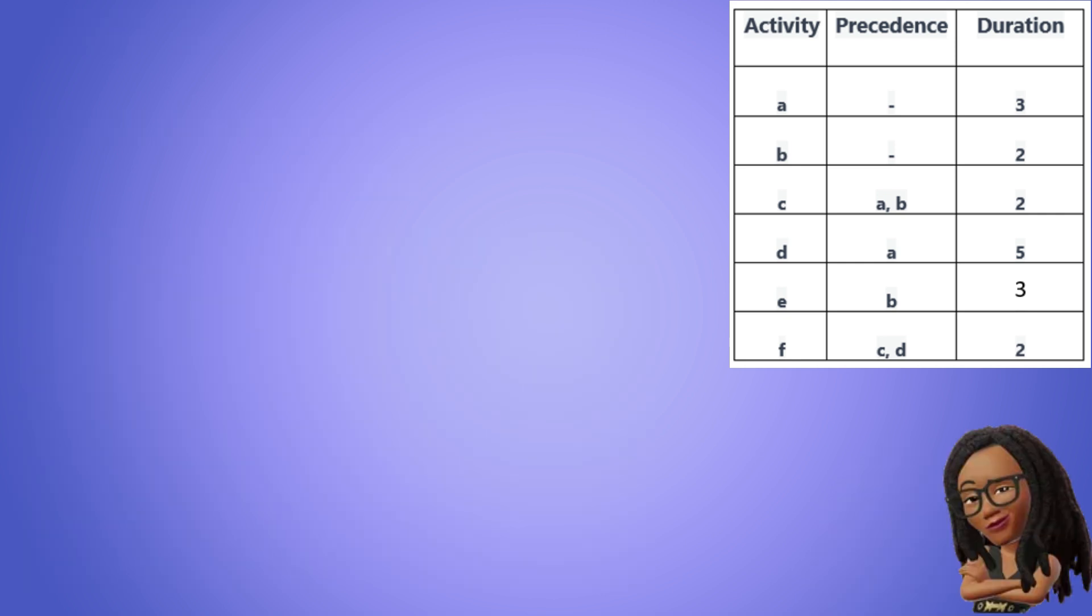Now let's get to drawing. First, we create a start node where all the activities will flow from. As we can see, both A and B do not have any precedence activities, so that tells us that they are the starting activities of the project. So let's use arrows to connect them to the start node. We will also add their durations for reference.